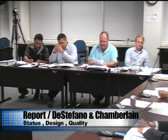Okay. Keep going. Bullet number 3. Not sure if all 4 of these are before you tonight, but let me just go down. I think you're going to be talking about the bioswale and whether to add landscaping to that for $34,540. That was the bid price. The alternate to that is that it's just grassed and topsoiled. As far as whether that's part of the base bid or not, I don't think we've vetted that out completely yet, as Ben mentioned.